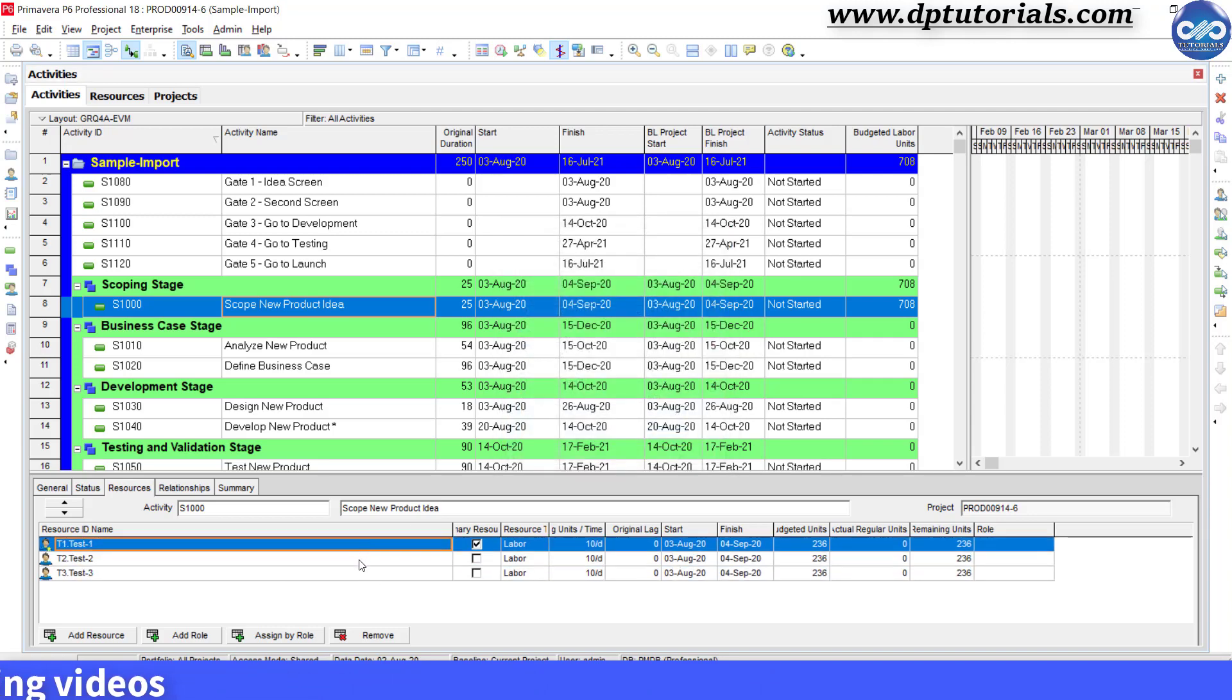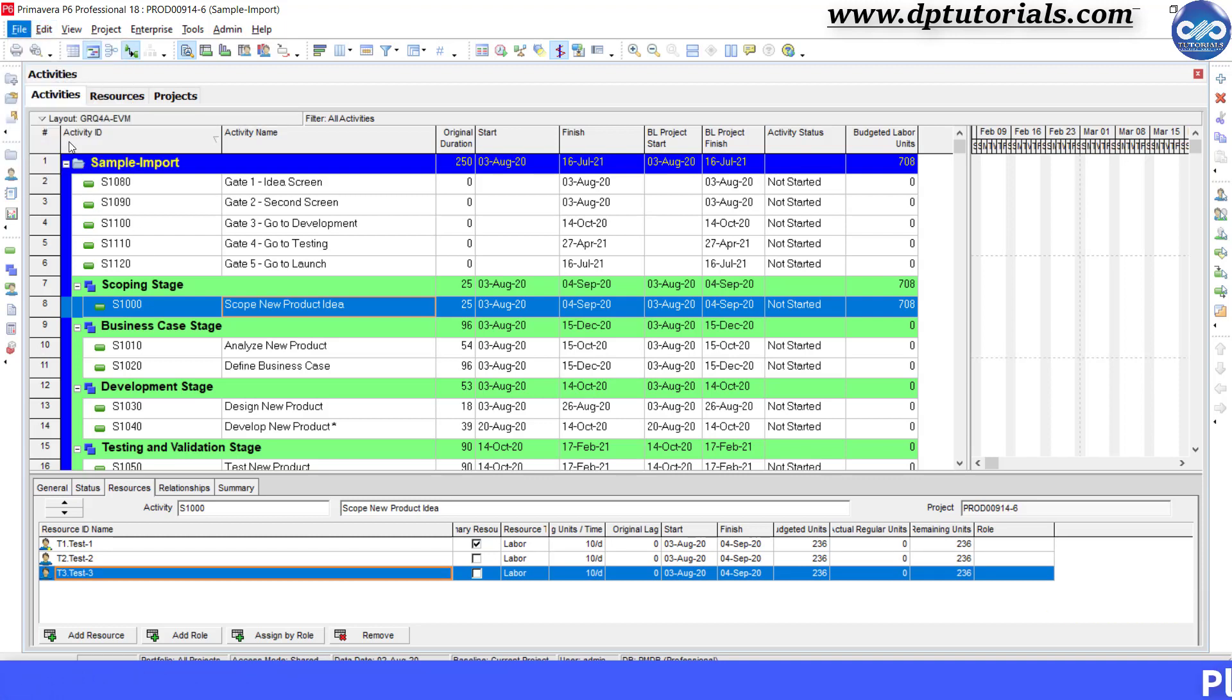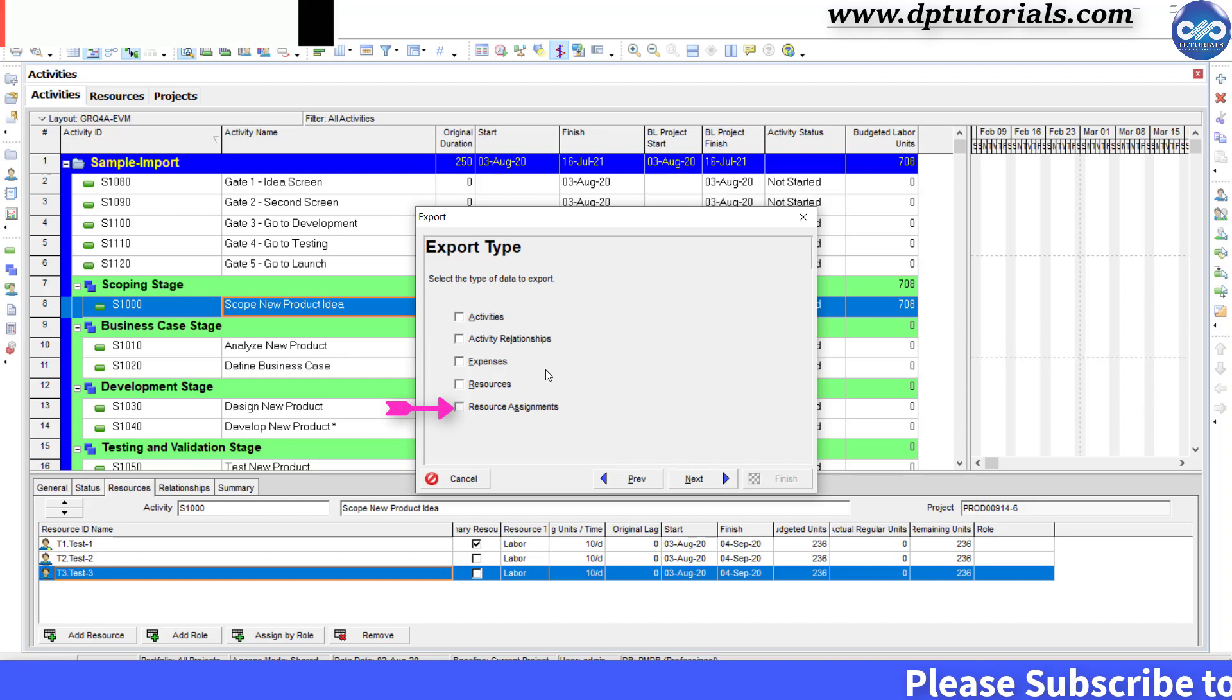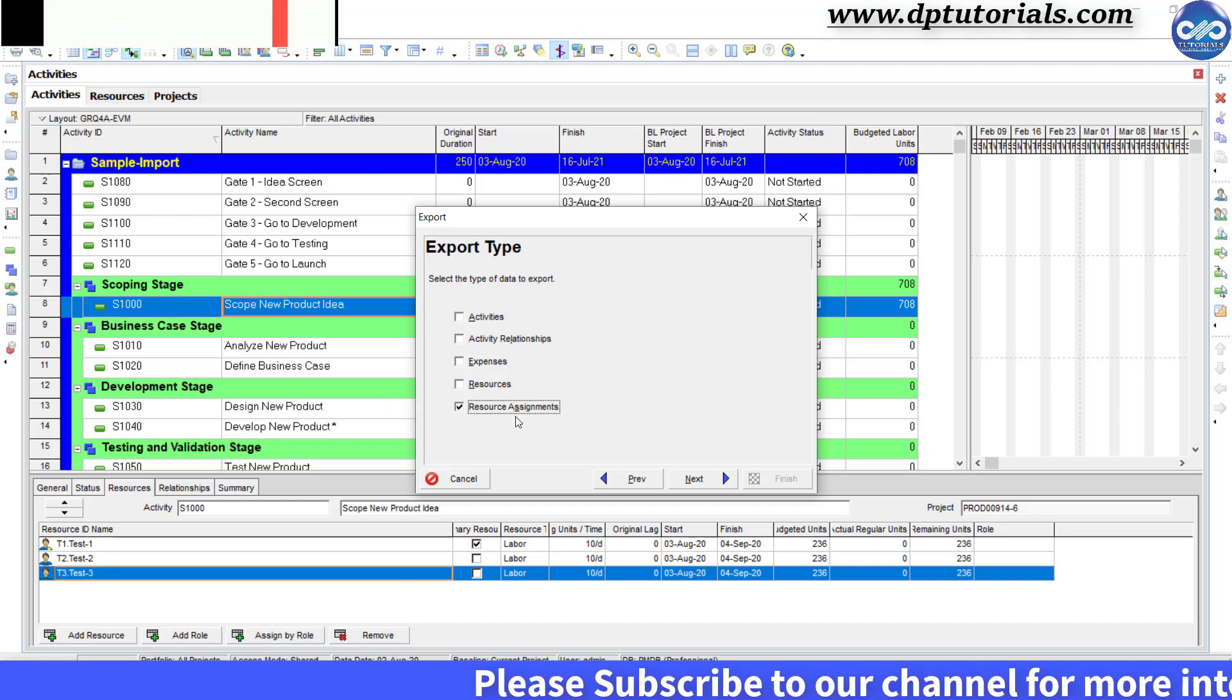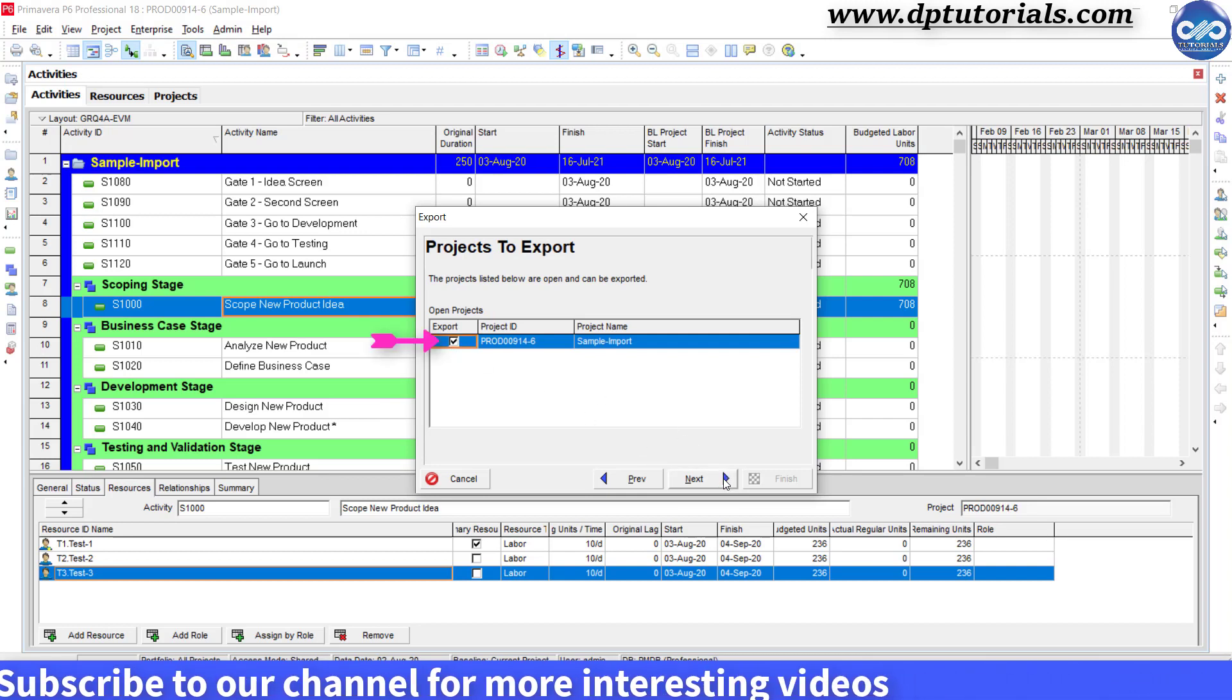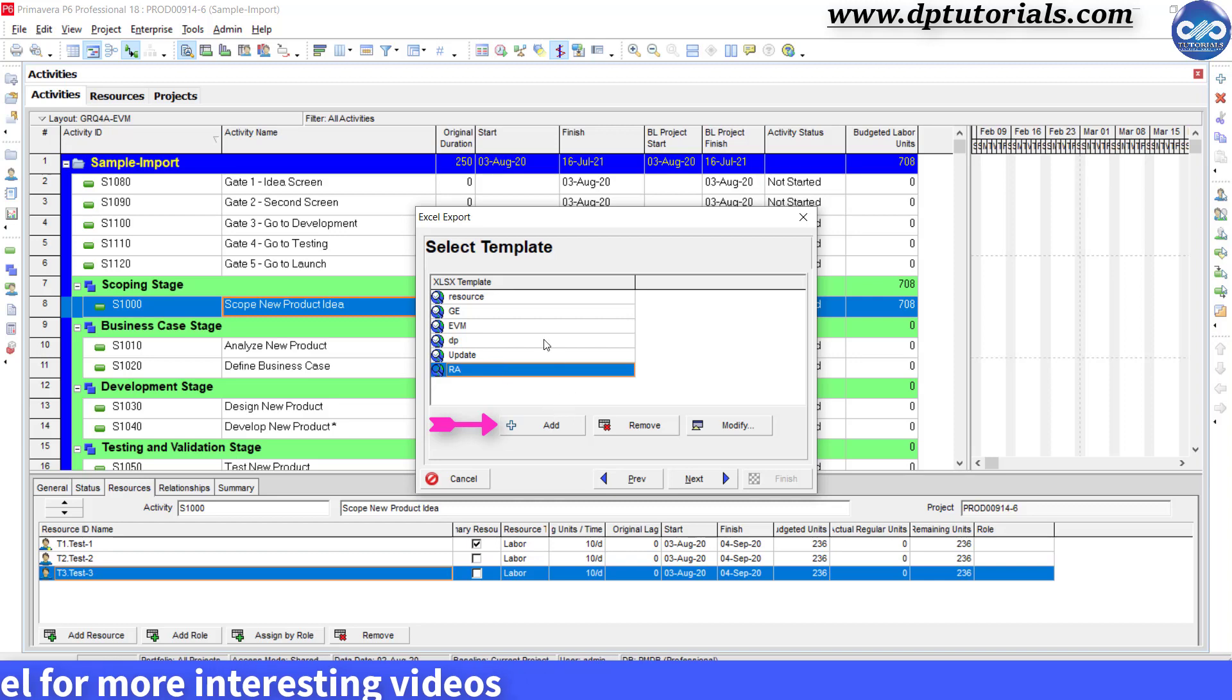Export this resource assignment from Primavera to Excel now. Go to File, click on Export, select Spreadsheet option, click on Next. Here, select Resource Assignments in this Export type dialog box and click Next. Select the Export, click Next.